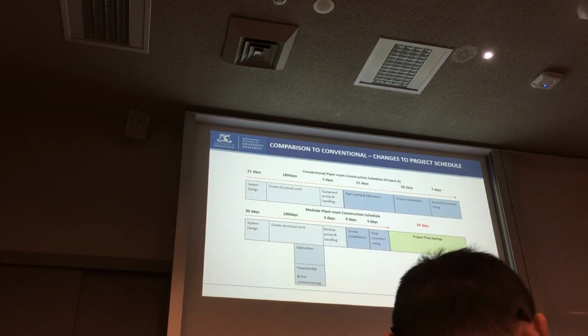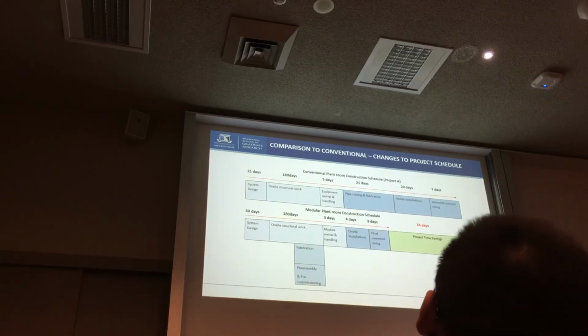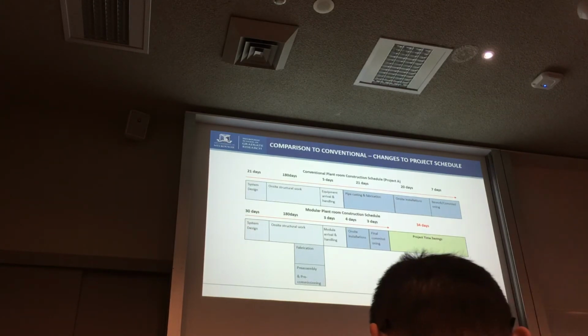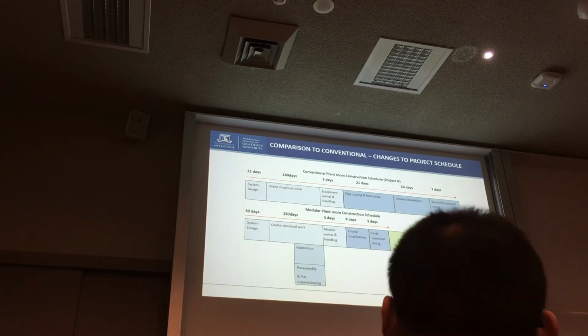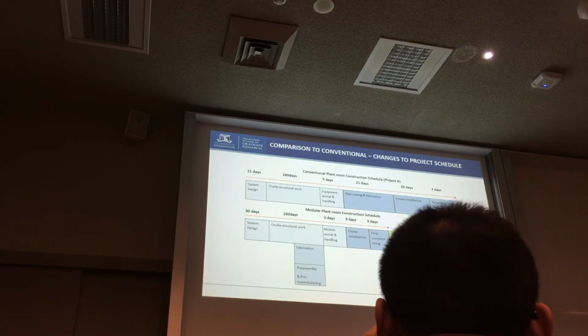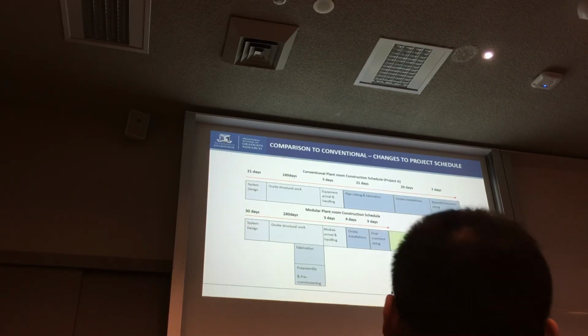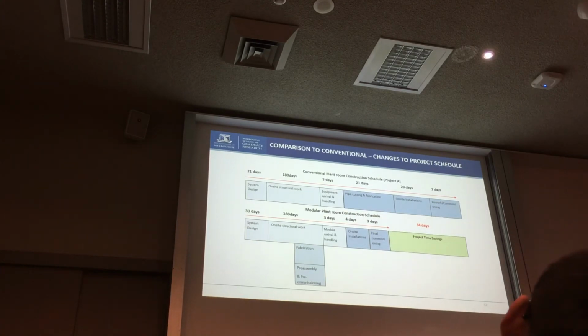So comparing the conventional case with regards to the project schedule, for this particular project, it shows the project time saving of almost 34 days, considering most of the fabrication is done off-site. So minimum amount of days was spent on installation and also final commissioning on-site.